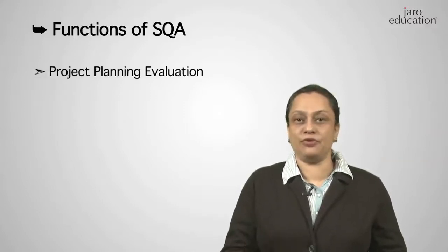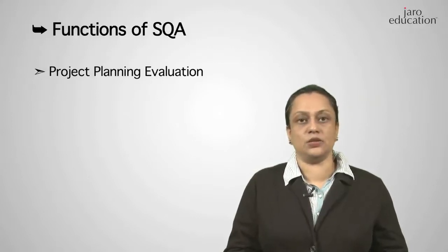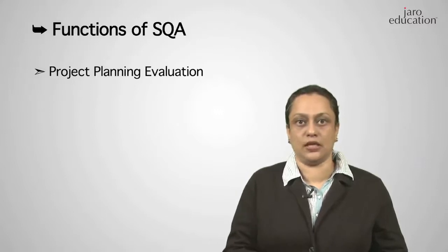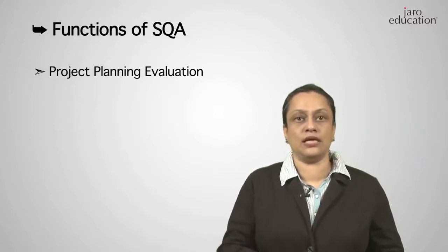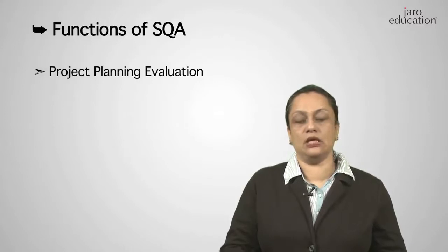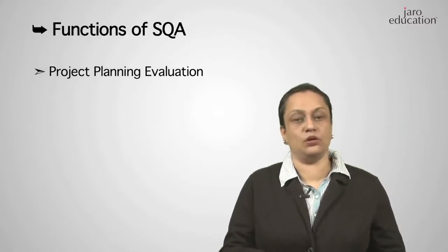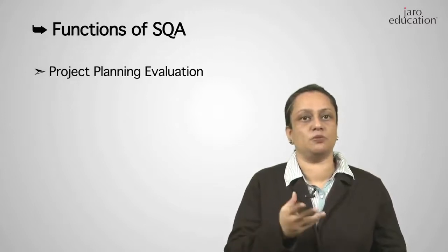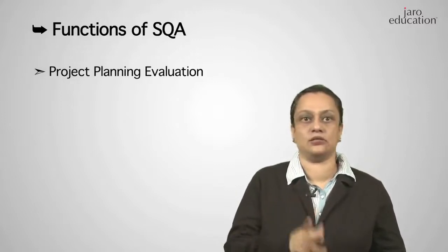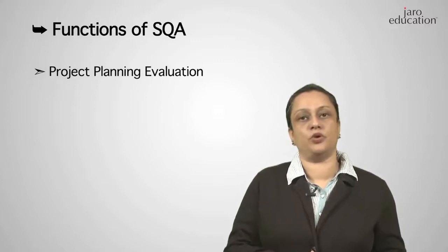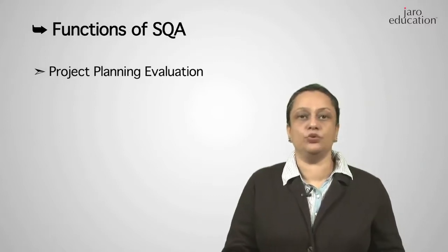The project planning phase is reviewed by the SQA. The project plan is, as I mentioned earlier, the Bible for the SQA. Based on that, all the other SQA activities will take place. Therefore, the completeness of the plans, which includes the SQA plan, configuration management plan, risk plan, communication plan, etc., the whole project plan has to be reviewed by the SQA.